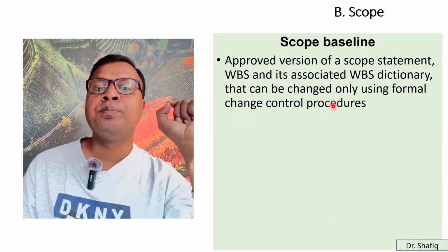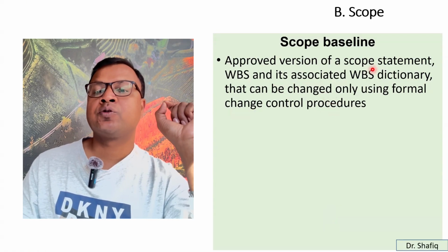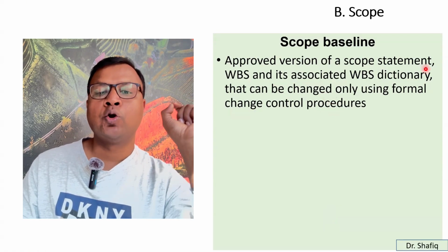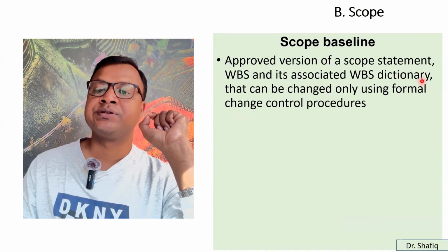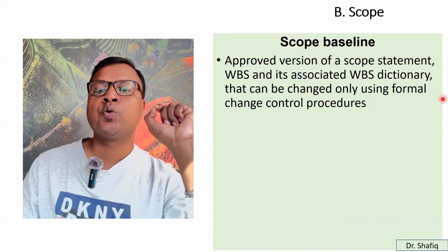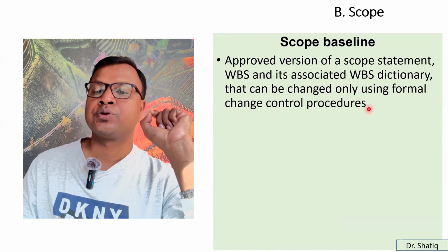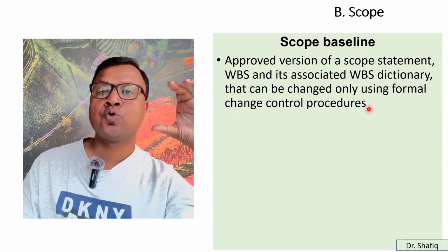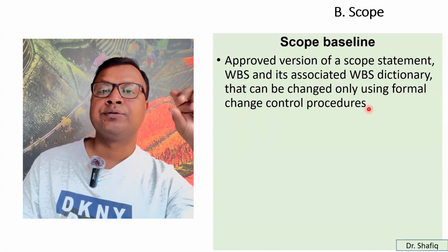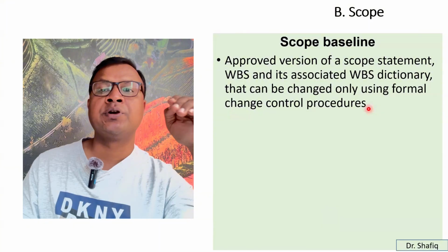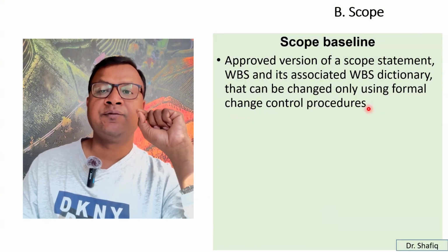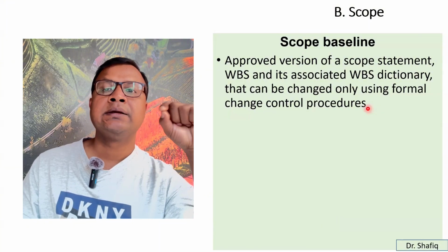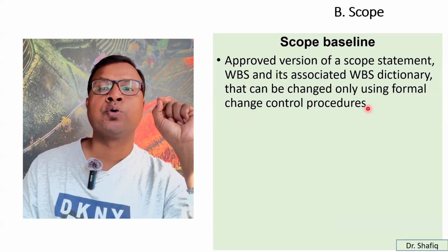Now, what is the scope baseline? It is the approved version of a scope statement, WBS, and its associated WBS dictionary that can be changed only using formal change control procedures. So this is the scope that is already approved by the authority. If you want to change something from this, you have to go through the change control board.